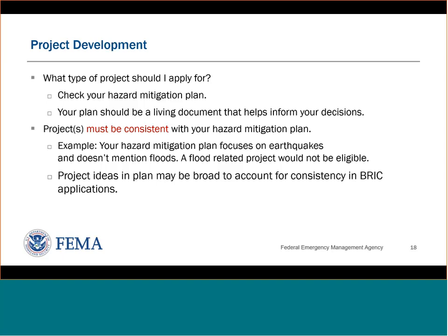flood-related projects. So for example, if your mitigation plan focuses on earthquakes because that's what you're most concerned with, but an opportunity has arisen that identified you have some vulnerability to flooding and you want to address that in the grant program, you would not be eligible to do that because your mitigation plan doesn't address floods.